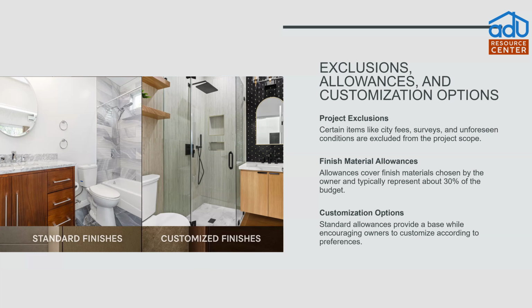Now, this is clearly an unforeseen condition. There's no way that the GC could have, from the outside looking in, looked at this landscaped yard and known that there's a buried pool under there. These are the types of unforeseen conditions that, when they come up, we obviously have to exclude and be able to kind of pivot when things like that happen.